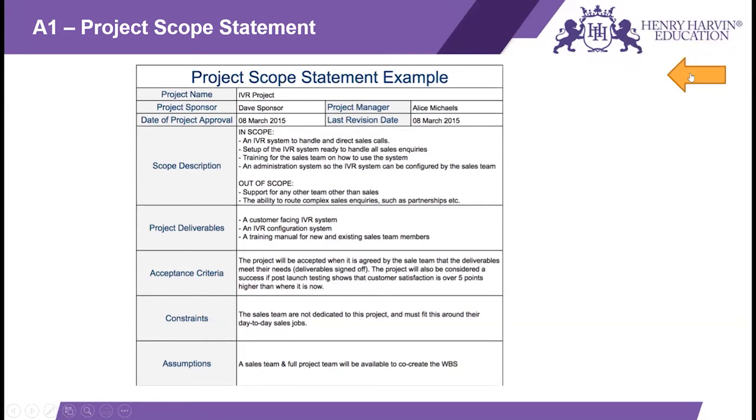But Ronnie, this could very much be similar to the charter as well. It would be more detailed. Hmm. The charter never says in scope or out of scope. It just gives it at a high level. Okay. Is that the only difference? Because the rest of the things I find similar. Constraints and conditions are also not there in the charter, I believe. No, it is there, but it is there at a high level. The scope contains more details. So the charter is a higher level form of the scope document.